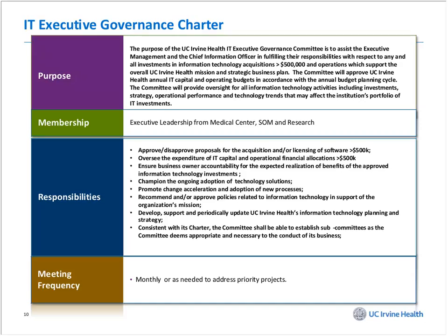Now, the cool thing about it is that the stakeholder has to come with IT. So it's not IT presenting the project. It's IT presenting with whoever the business stakeholder is that's looking to get something approved that's greater than $500,000. Now, this would be most likely outside of the normal capital budgeting process because executive IT governance is involved in approving that each year. So if it's greater than $500,000 but it's already been approved, you don't really need to go through that process again. You've already done that vetting.